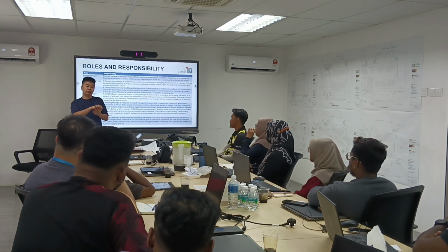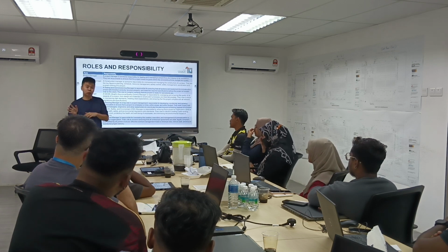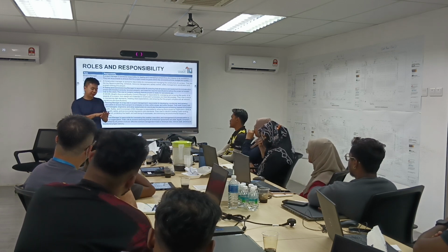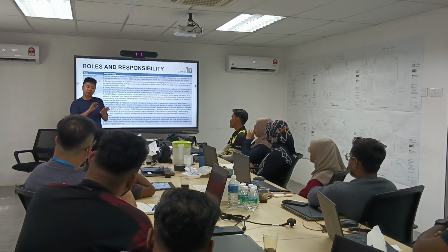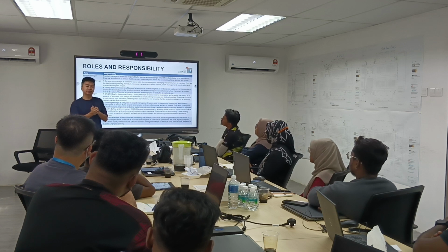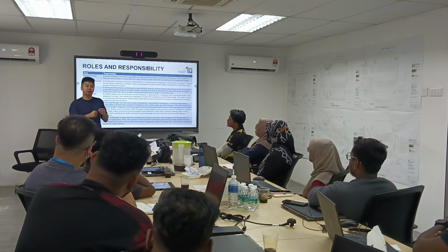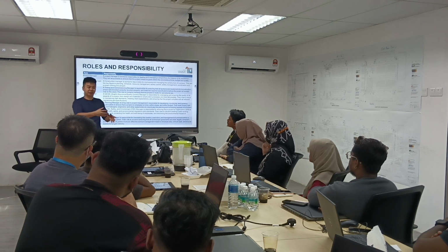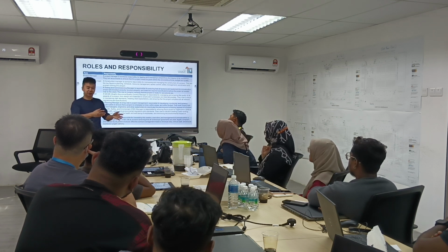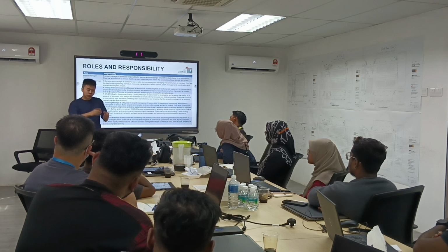Yesterday I went for a sidewalk with Matthew in JDC 1, day 2. I told Matthew that compared with day 1, I feel that the quality is dropping. We had a discussion yesterday. Matthew's reasoning is that he feels I currently injected too many juniors into the team, so we lack senior people to guide the juniors. That's why the juniors might not know what is the correct quality that you want. This one I agree.